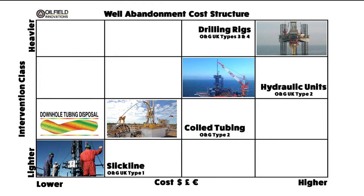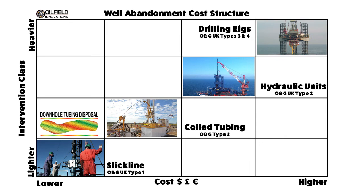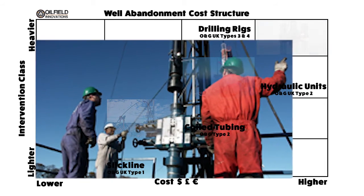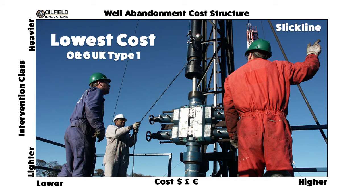This is a conventional oil and gas cost structure for well intervention. Lighter to heavier intervention classes are on the vertical scale and lower to higher cost intervention methods are on the horizontal scale. The oil and gas UK type 1 intervention uses the lightest and lowest cost equipment, which is slickline. Slickline uses wire to lift and lower equipment within a well and can be operated by about three or four people. The cost of placing an abandonment plug with slickline and pumps can be measured in thousands per drum of cement, which is at the lower end of the cost scale, but also is the most environmentally friendly and safest way to abandon an oil and gas well.